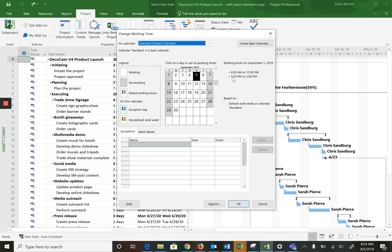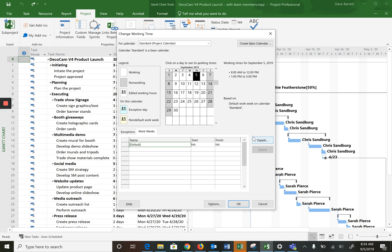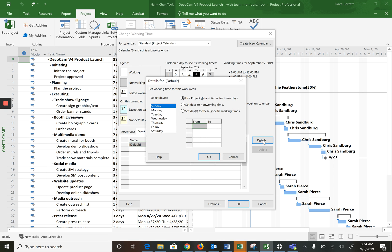Let's look at two things. Step one: we would like to define Saturday as a working day — essentially a six-day work week. In that case, we click on Work Weeks, click there, and then click on Details. This is where you indicate what's different from the standard. We'll say that we want Saturday to be a work day and just give it the times, keeping it consistent with the other days. We'll set it to 5 p.m., so it's an eight-hour work day. We've now made Saturday a work day.